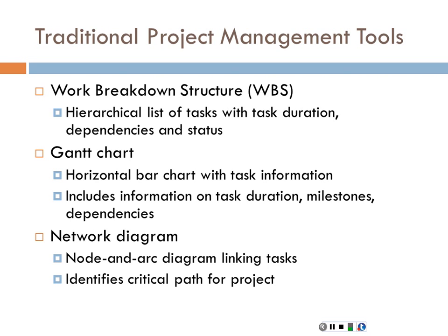One might take just a few hours. Another one might take a day or two. So you figure out what those are, and then the dependencies. Right. Step 5 cannot happen until step 2 has been completed. So step 2 then stands in the critical path of step 5 being completed. You want to know what those dependencies are and how they're interrelated. And then something that enumerates the status of the project: what's currently completed, what has yet to be done, what's in process. Obviously, this is an evolving thing, right? So each iteration you're going to update that information.